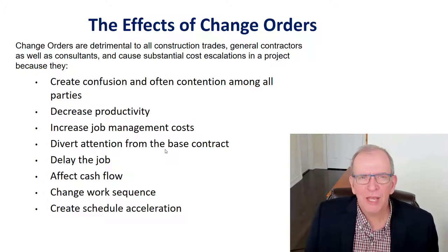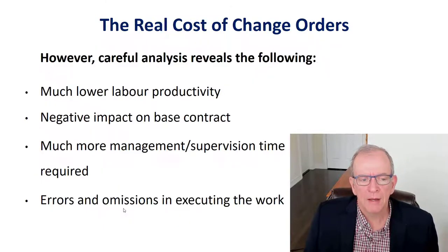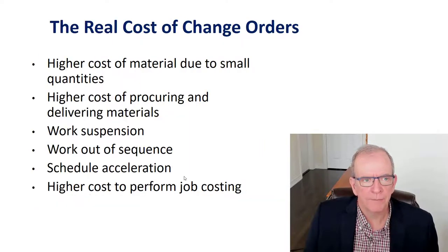Not really reality very often, especially when the volume of changes can really escalate on some projects that are fast-tracked. There wasn't a complete design done. There's a lot of things that were missed, incomplete drawings, incomplete documents, design errors. These can all lead into some of those impacts that make it very difficult for you to be cost-effective on your project. So keep in mind these points here, as I was saying.